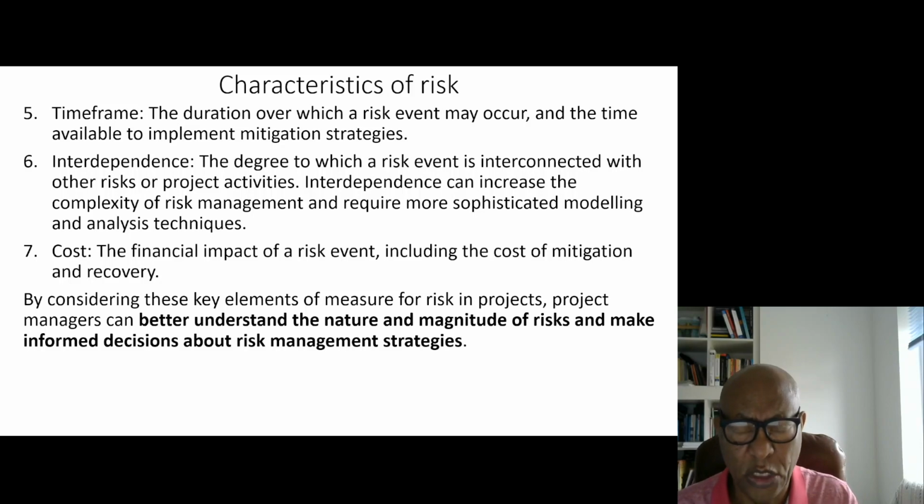Okay, after identifying risks, one thing you should do is check whether there is any interdependency between all these risks. If so, if one happens, most probably the other is going to happen. So that really helps us in terms of managing and planning for the risks.